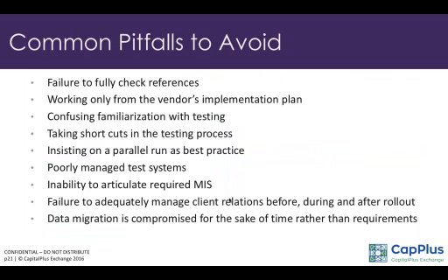Often, a lot of people confuse familiarization with testing. They give the system to the users to play around with. And sometimes vendors think that, okay, this is testing, which is not the case. To do testing, there has to be test data, there has to be test plans. Test plans have to be written down, and you need to test going through every stage of that process.